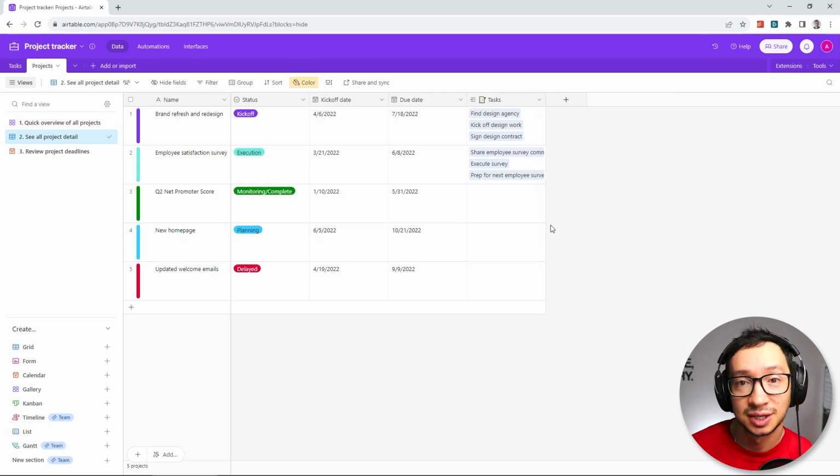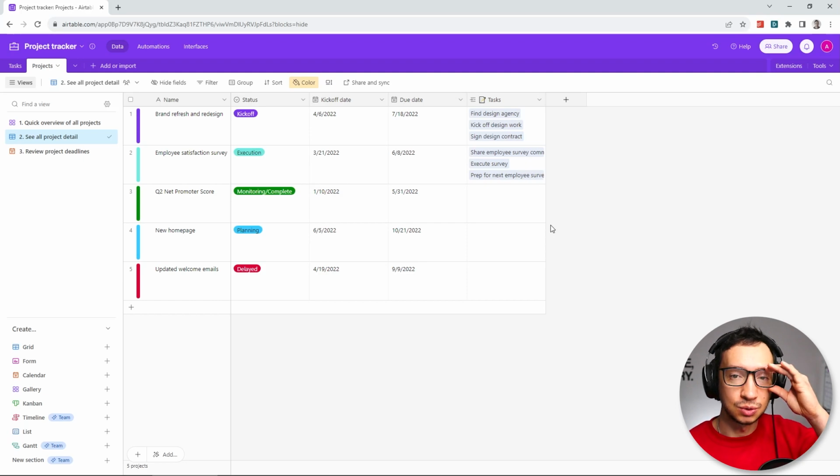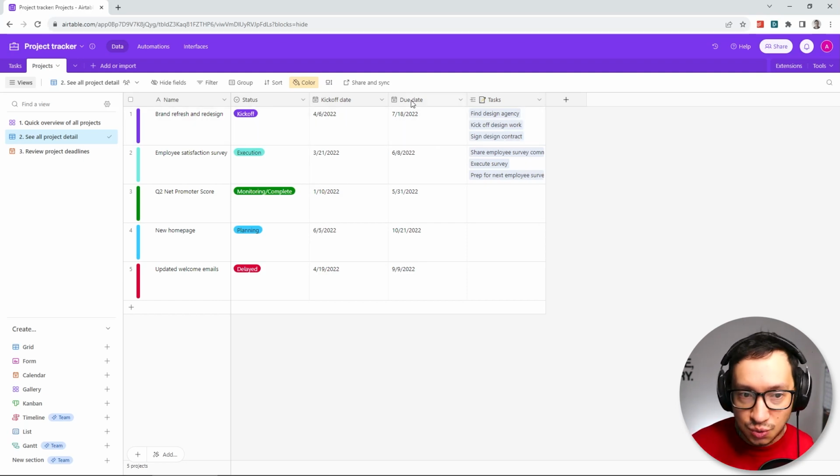For the remaining fields that we have, I'm going to do one slight change for the due date. Right now, it's something that you manually specify, but if you have ever seen any video from the previous episode, we usually enter, let's say, a delivery task, which is the final task that's done in the project. And what you can do with Airtable is set the due date of the project to automatically show the latest due date that you have in your tasks table.